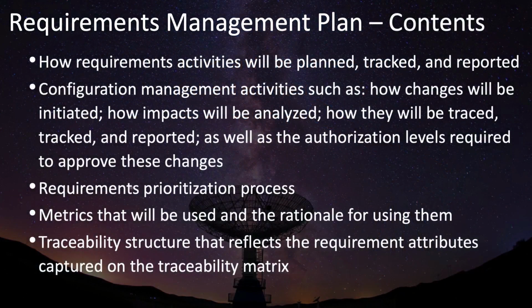The requirements management plan will include rules about how to plan, track, and report on your requirements activities, basically your business analysis plan. It'll also include some configuration management rules. Recall that change management is about how changes are requested, reviewed, and approved, whereas configuration management is how changes are made and managed.